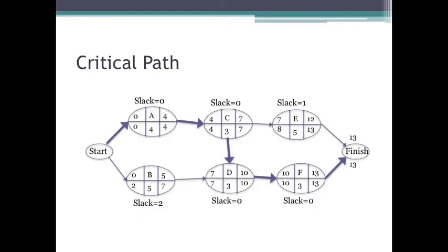Okay, so here's our critical path, A, C, D, F. This is the set of tasks that is going to determine how long the project takes. This is a set of tasks that must start right away, that cannot be delayed. So, when managing, how much attention should you give to these tasks? Well, you need to be sure that these tasks occur on time, that these tasks are not delayed, because to delay them would delay the entire project. So, it's a management tool.